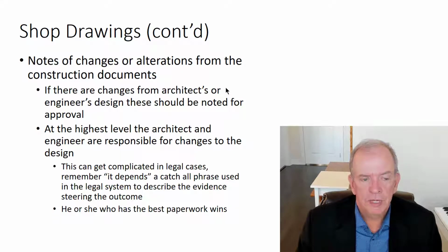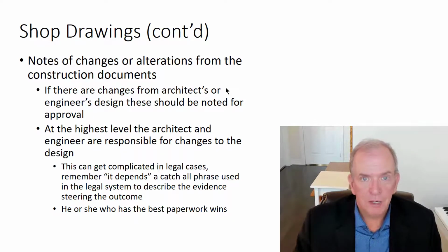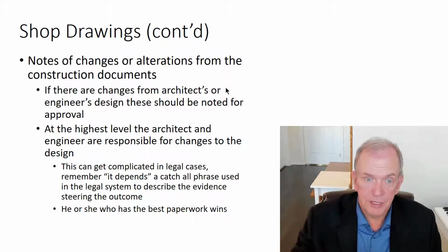There's an old saying: he or she who has the best paperwork wins. There's a lot of truth in it. And believe me, in construction, you need to do your due diligence in making sure that the documents are carefully reviewed. Maybe you see something that the architect missed. Well, let them know. If you need some extra information, that's what an RFI is, a request for information. And it's documenting it. It's not just verbalizing it.